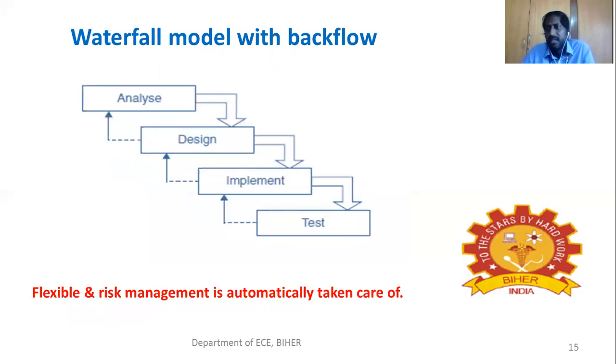Then to overcome the limitation of the existing waterfall model, the backflow model is adopted. So analyze and design, implement and test, everything can backflow. We go back to the previous phase. If you find any issues during the design, then through the backflow we can change it. If you find any difficulties in implementation, we can change it